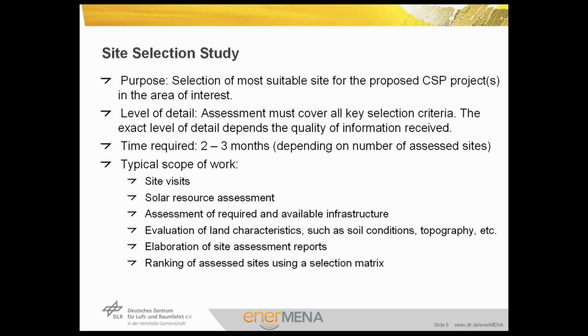The time required for such study is typically between 2 to 3 months. These are typical figures and could vary depending on the site, country, utility, and level of development of a project. And the scope of the study covers the site visits to get to know the site itself. Very important is to conduct a solar resources assessment, the assessment of required and available infrastructure, the evaluation of land characteristics such as soil and subsoil conditions, topography, etc.